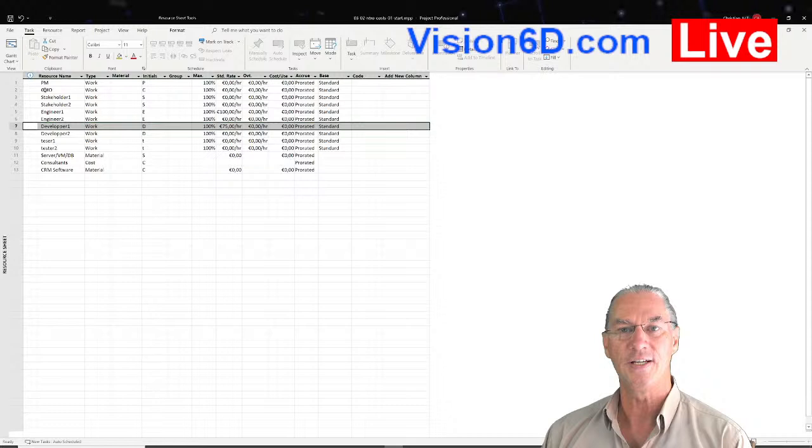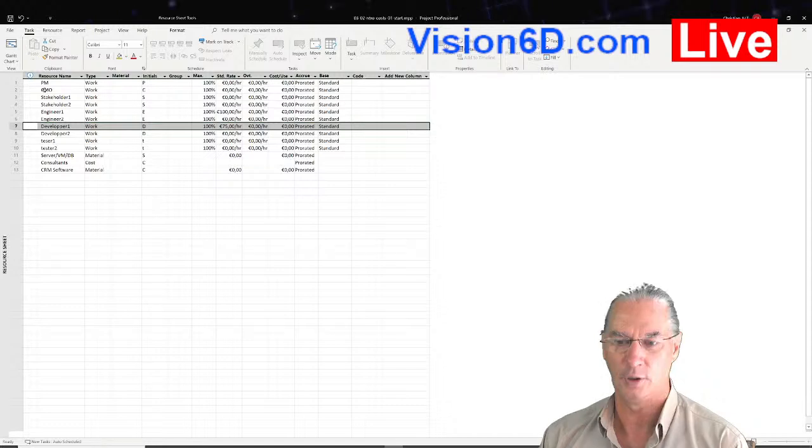The rate is the real internal cost of the developer, plus a margin that the company wants to make. So this is what is billed to an external company. So what I want to say as a second point on this is that it's not really important here in our example to know exactly the value. It is a way by which we want to estimate the costs in the project.